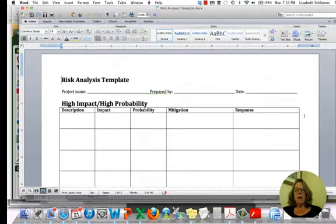So what you'll need to do is prepare this risk template. You don't necessarily have to do it now because you might not have your project defined, but as soon as you get it defined and as soon as you have an idea of what you're going to be doing, your project team should get together and you should start creating this. Okay. Thanks.